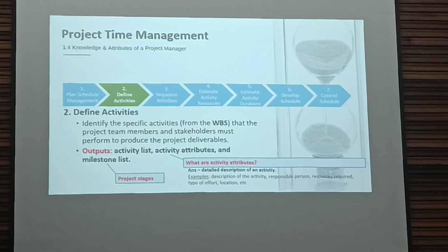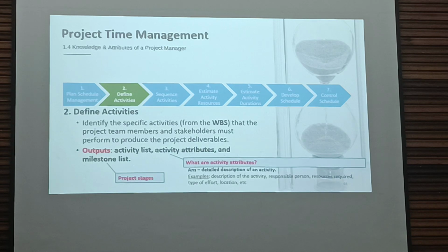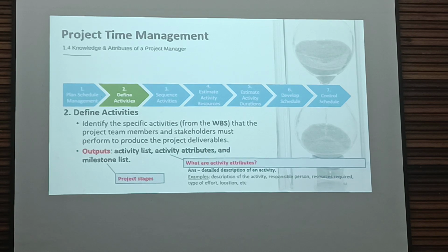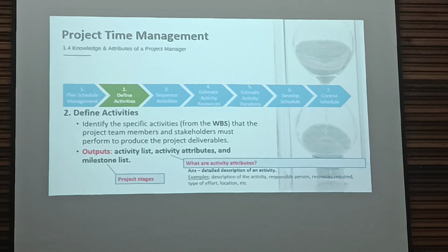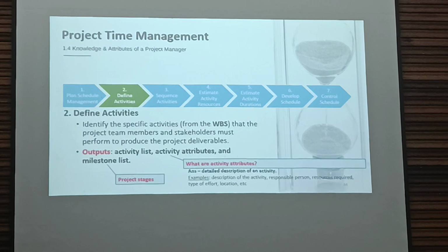If top management asks you, give me the milestone report. I want the milestone report. What does it mean? If someone asks you, please give me the milestone report, that person wants to see what stages are completed and what stages have not started. That's what bosses want to know.